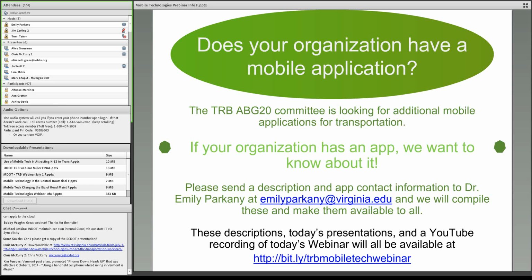And from the Utah side, the Citizen Reporter app took, I'm going to say, probably 6 to 8 weeks to develop. We have not done any updates on it, but we have been considering adding some functionality to it. The Click and Fix app, I'm not the project manager for that. I believe that was a longer process just because the app was intact, but the back-end dashboard was not, so I think it was a longer process.